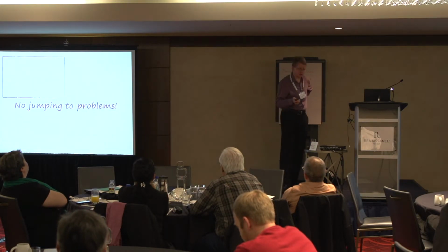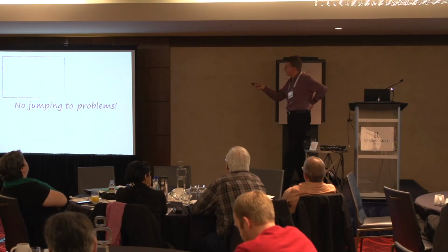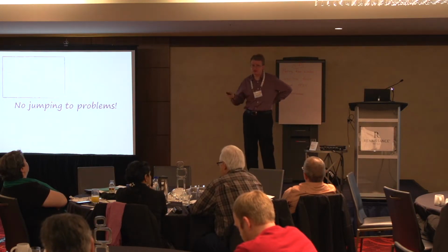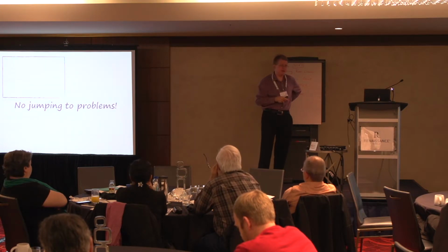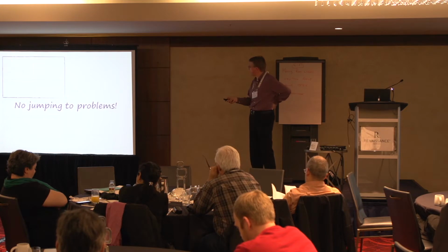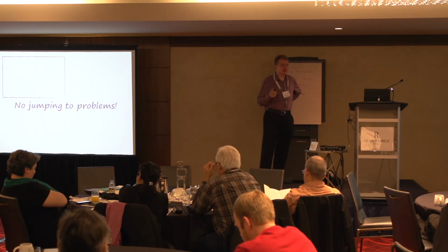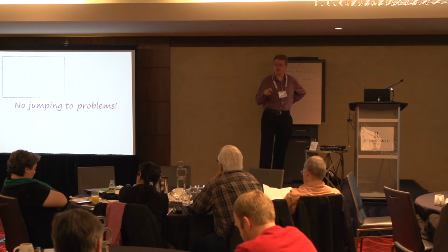So A3 is not only about not jumping to solutions, but also about not jumping to problems. So if you look back at the blank A3 sheet on your table, roughly the upper left quarter of it is about simply understanding the current condition before we even state what the problem is.